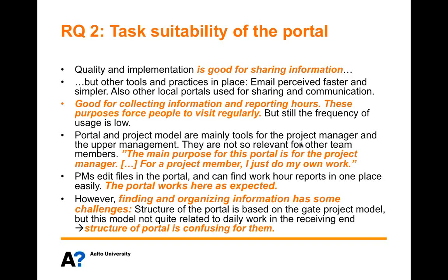And as this project is quite separate from their work, not all the employees see it as their main task, so they prefer to use their previous tools. The portal was good for collecting information from people, for example reporting work hours, and these kinds of purposes force people to visit the portal regularly, but still the frequency of the usage was quite low.